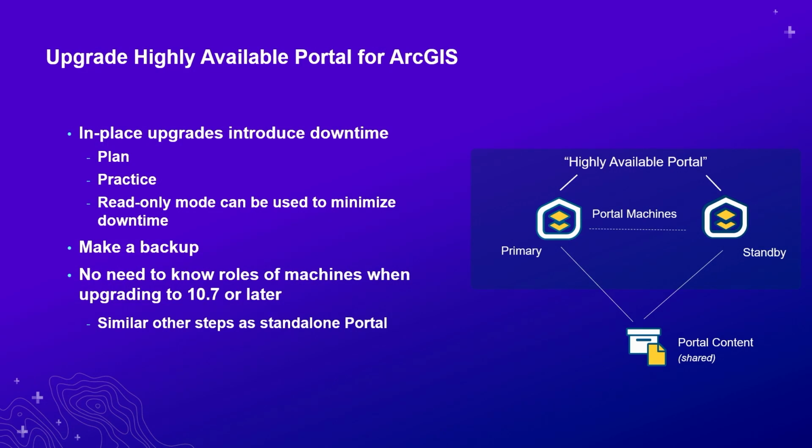It's important to make a backup. Certainly before you start an upgrade, you might want to make sure that you're creating a backup, whether this is a VM snapshot or using the DR tool. Important that you can roll back to your previous state if the upgrade were to fail.